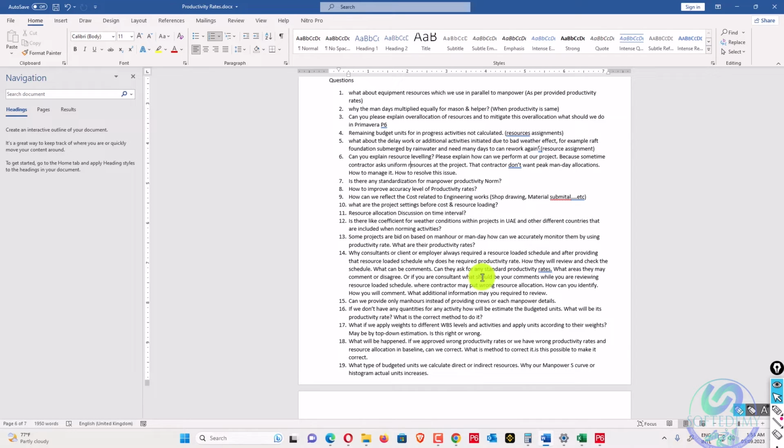Like if a project has one year of work and there is a cost of 50 million SAR, or 50 million dollars, he says I have a peak of 600 man days, so he will just create a back loaded, front loaded or triangular shaped curve of resource allocation, and assign some dummy resource allocation. Because resource allocation can be created from anywhere, you can assign any coefficient and create any curve.